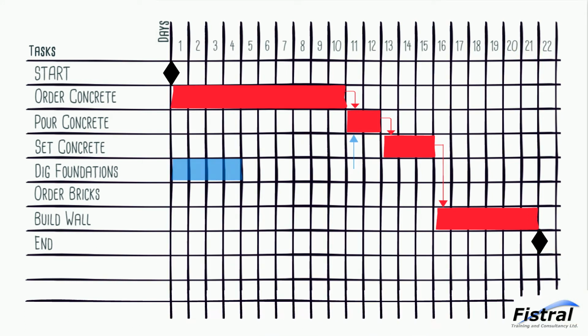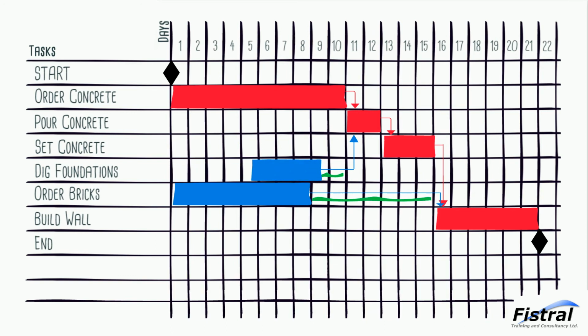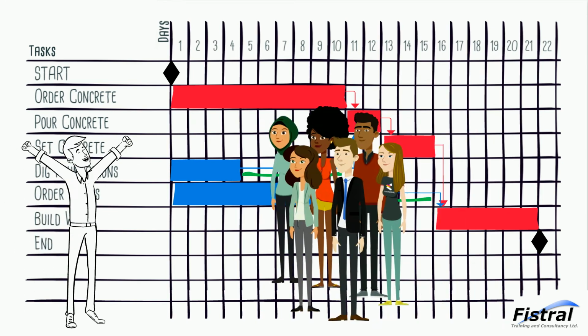Next, we put all of our other tasks in the order that they appeared in the network diagram. So I've added all of my tasks. All that's missing now is the slack or float. And if you remember, this is the permissible delay, my wriggle room. This is drawn as a line, showing how long a task could be delayed or could overrun. It basically acts a bit like a slider bar. This task could happen anywhere up or down this line and we'll be okay. And that's how you create a Gantt chart properly.